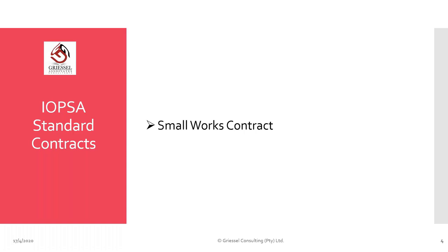And I never know what to answer to that. The reason for that is that it depends on what the material costs are, what is being put in, what equipment is being used. The easiest way to distinguish between these contracts is to say the small works contract is meant for small works, mostly at private homes or where there will still be substantial occupation, and the duration of the contract is not going to be very long.